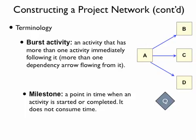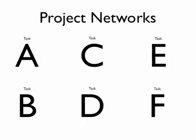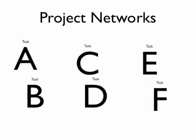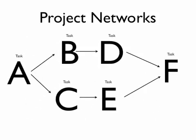A milestone is simply a marker in our project for when we complete significant events or deliverables. Importantly, a milestone does not consume any time within the project network. So what we do is take these various work packages, consult with the experts in the field or within our organization to work out the dependencies, and create the network. In this case we've taken six tasks and created a relatively simple network.